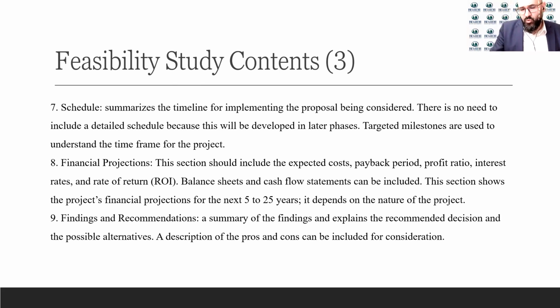In the first month, I will have to ask the people, that's the survey. The second month, I will look into a location, maybe in the downtown. The third month, I will proceed with asking the permission from the city. And then the fourth month would be just remodeling and designing. The fifth month, I will be stocking the products, and the sixth month would be opening.